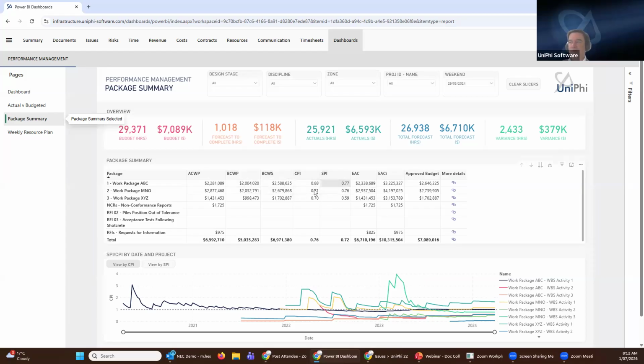And again, remember, one is good. And what we can do is compound these to actually get an estimate at completion, which is an overall forecast. So these two measures here we're looking at, one is an indicative measure, which is why it's got the little I there. You can see that the indicative is compounding this performance capability to say this is actually going to cost more. And then this is a bottom-up remaining forecast that's coming up to an estimate of completion.